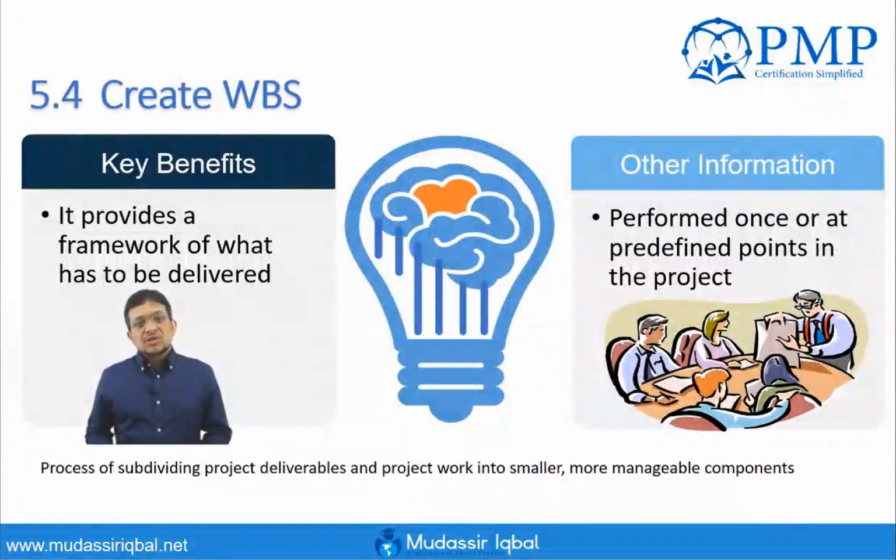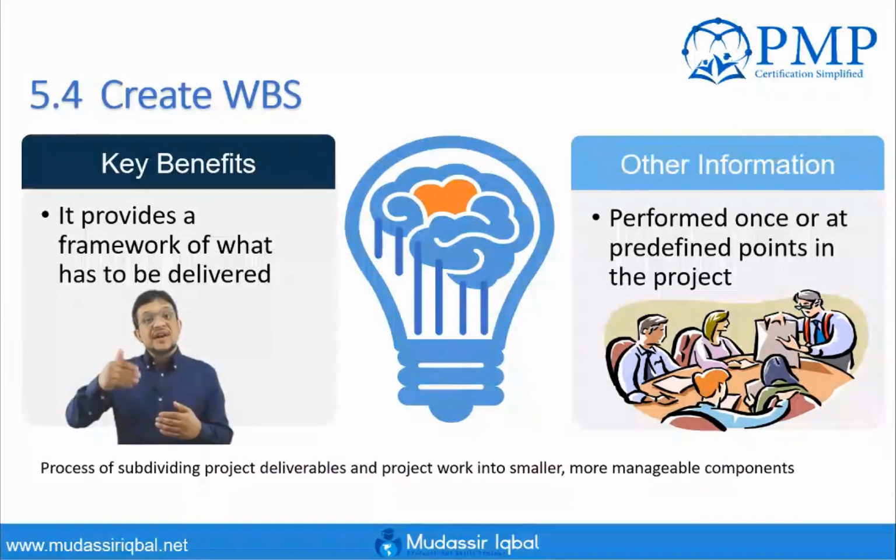Create Work Breakdown Structure is the most important process in the whole project, specifically in the scope management knowledge area. The reason is that this is where you figure out what you need to deliver, in terms of project deliverables, project management deliverables, or anything. It's a planning tool: first you identify anything and everything you need to hand over, and then you work backward in the remaining processes to identify the activities that you or your team need to perform so that you can define the deliverable.